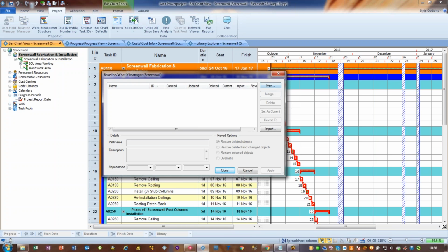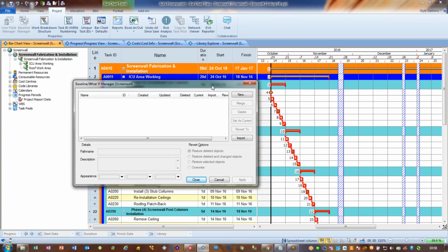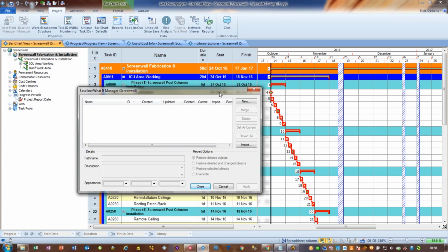So typically any changes, any additions to the schedule, like Brian said, would change the baseline. Okay, got you. You could add them to the baseline, but I would suggest that would really be a separate baseline. So if you had extra work to do that wasn't in the original schedule, then it wouldn't have a baseline task against it. But that's exactly the same as it was in P6, really.